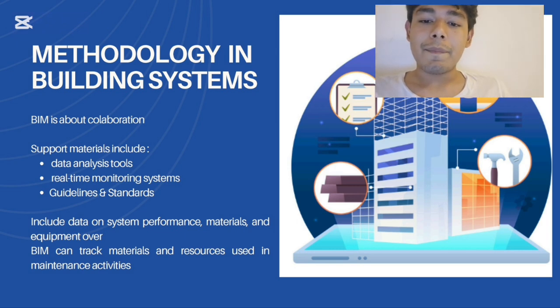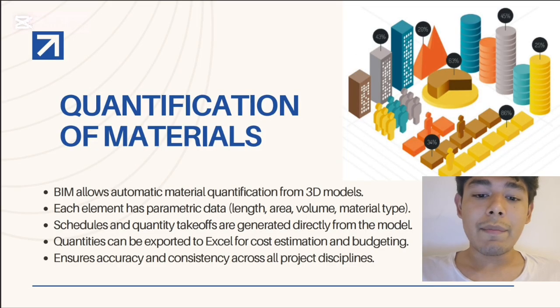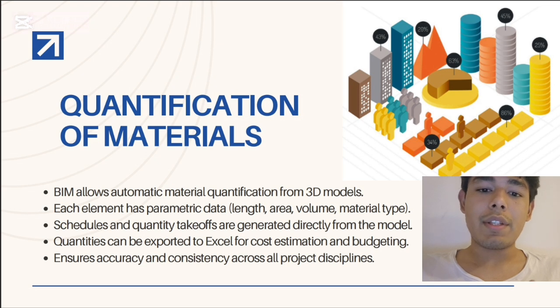Well, about the quantification of the materials, BIM allows automatic materials quantification from 3D models. Each element has parametric data like length, area, volume, or material type.